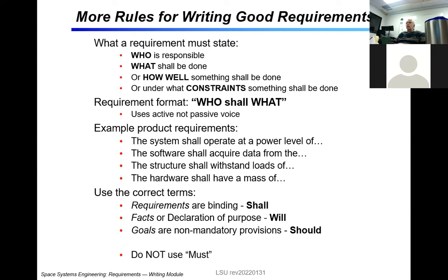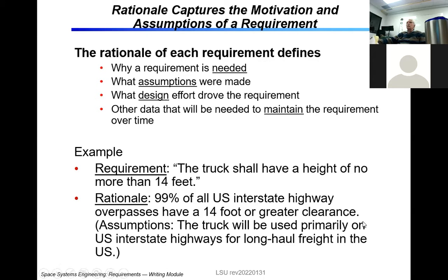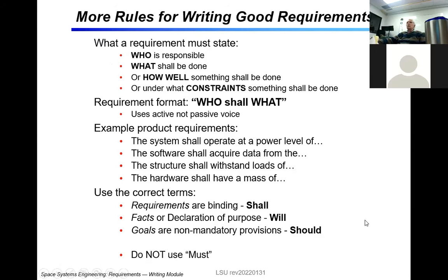Correct terms: shall, will, should. Do not use must. Okay. So it's either shall, will, or should. No must. Okay.